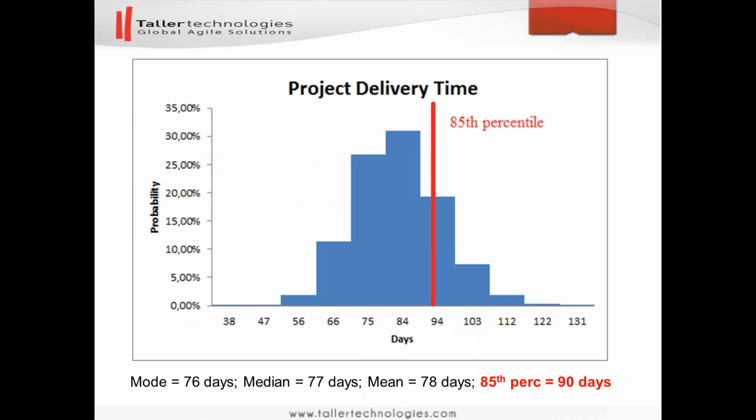So the 85th percentile is my personal choice. The way we manage is that we should always take some risk, right? That something bad will happen. But if you see my screen right now, the 85th percentile actually is not that risky, because this data is statistically generated data, but you can assume it's real data, right? 50,000 runs of a project.